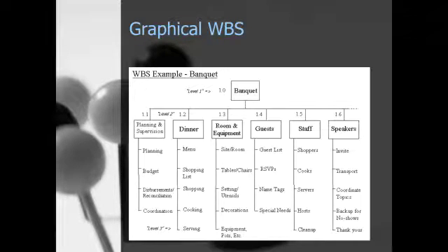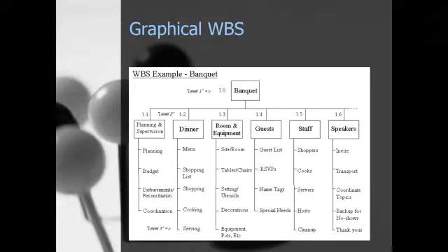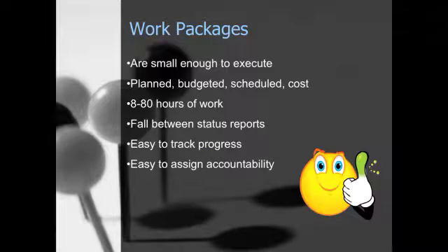The beauty of coming up with this and brainstorming this beforehand is that it makes your project plan so much easier to put together. So it's really a brainstorming activity to create your project plan to make sure you're not missing anything. So those work packages, so the ideas of like planning and budget and coordination, should be small enough to execute. Ideally, in a real project plan, it should be 8 to 80 hours worth of work.